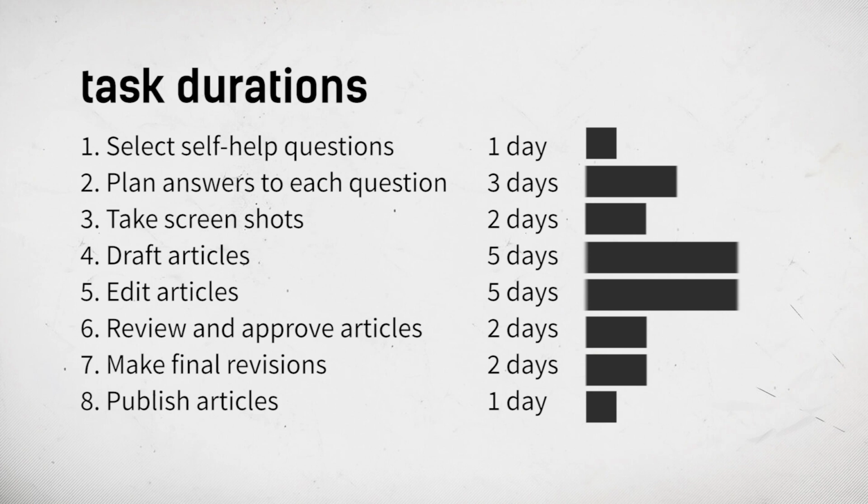3. Take screenshots, 2 days. 4. Draft articles, 5 days. 5. Edit articles, 5 days. 6. Review and improve the articles, 2 days. 7. Make final revisions, 2 days. And 8. Publish the articles, 1 day.